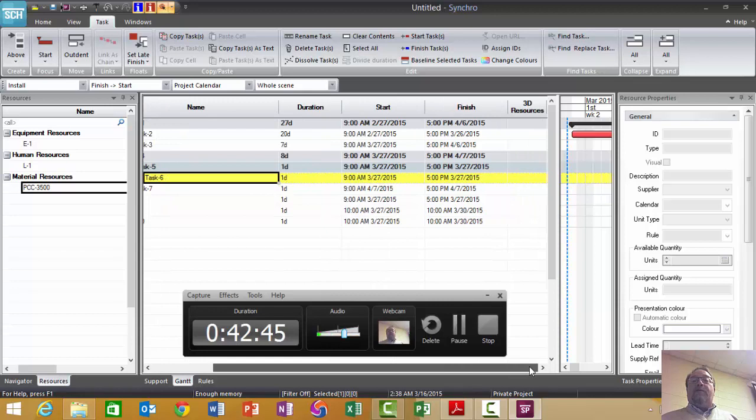The other thing that I will look for in a schedule: what's the condition for calculating the critical path in a schedule? Well, the definition is the longest path through the network of the activities. That's right. It's the longest path, and if you delay the longest path, you'll delay the project, because there could be activities that branch off of the critical path, and those will have float because they're not on the critical path. Activities on the critical path have 0 float.